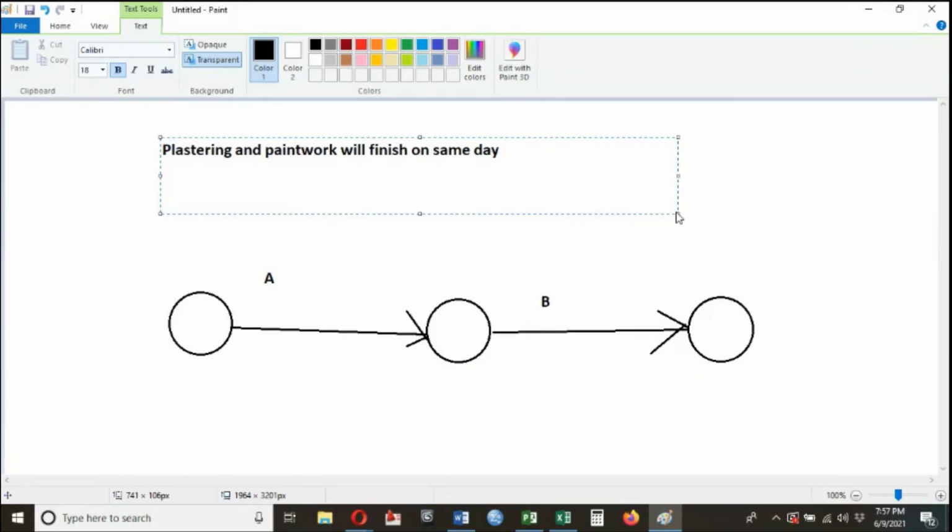Yes, the student who is asking for the calendar: before the starting of the scheduling of the project, you have to make these changes prior to the project. By making these changes, you will only then be able to schedule the project further. Else, you will face so many problems in scheduling the project. You will not find the critical path. You will not have accurate or proper durations and links of the activities.